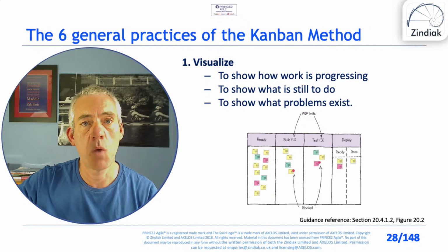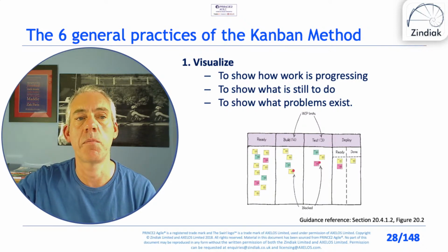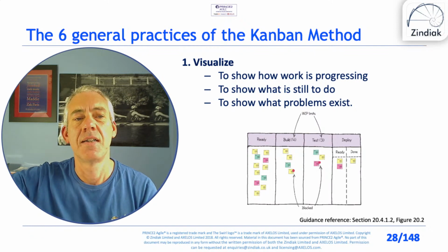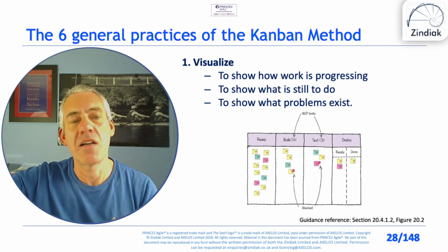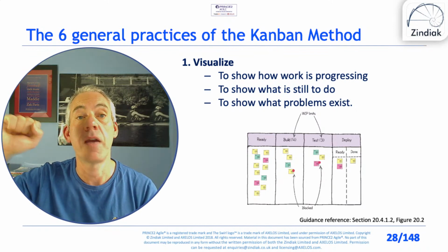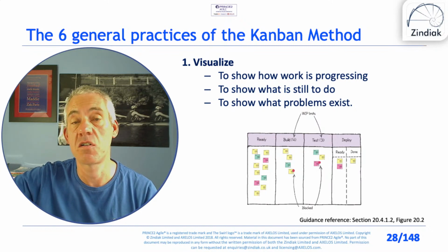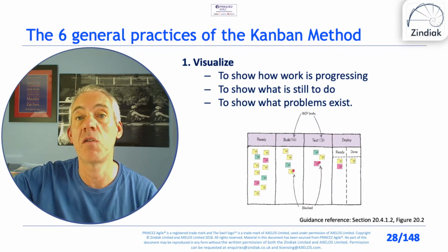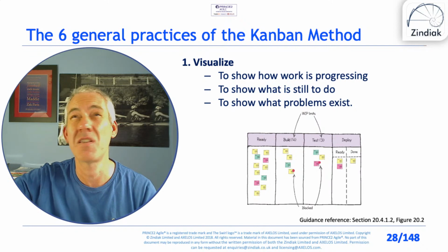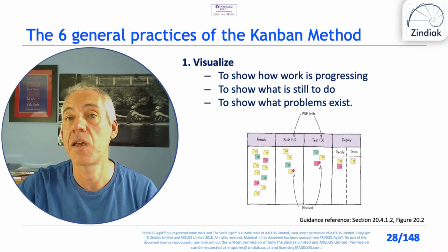What I would say about using a whiteboard for Kanban is it can be great for a development team. So if you've got maybe about a dozen backlog items, not very many more, it can work really well. It works good at a sprint level because your sprint backlog might be around a dozen, maybe 2 dozen at max. If you've got more than that, I'd question whether you're breaking them down too much.